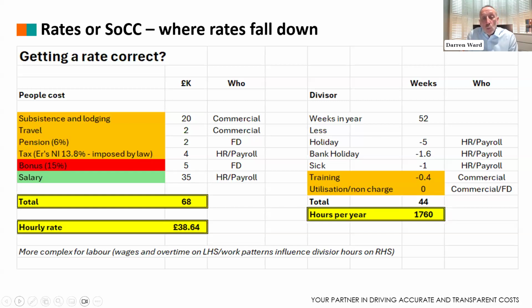So what I find is you have to work with those people, understand what their concerns are, again, share how you look to process that data to give them that comfort and assurance. So again, this is the importance. If you're going to do open book audits on people costs, you need to know how to process this information. You might end up working, for example, with anonymized data. Yeah, so there are good workarounds. So firstly, don't be surprised if it gets put in front of you as a blocker, but work with that contractor because they would have done these audits before 99 times out of 100, and it's just working out what the process needs to be.